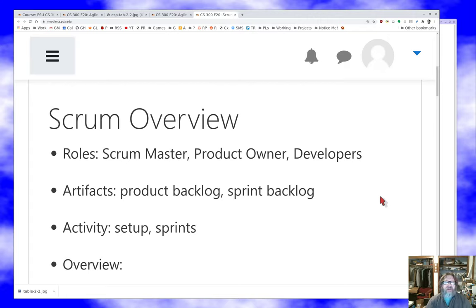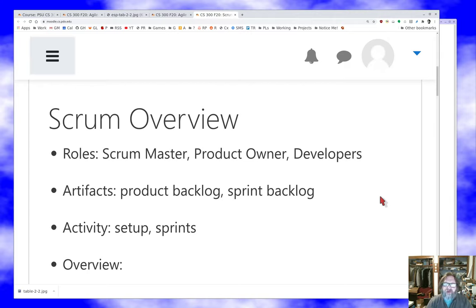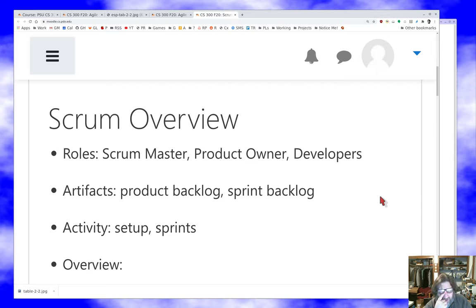I'm just going to give you the quick 10,000 foot view. The development team has two special roles — a role being just something that some person does. The special roles in a Scrum team are the Scrum master and the product owner, and everybody else is a developer on the team. Scrum works best with teams of five to eight people counting the Scrum master and product owner, so you might have three to six developers. More than that and it tends to be unruly; less than that and it tends to be hard to deal with.